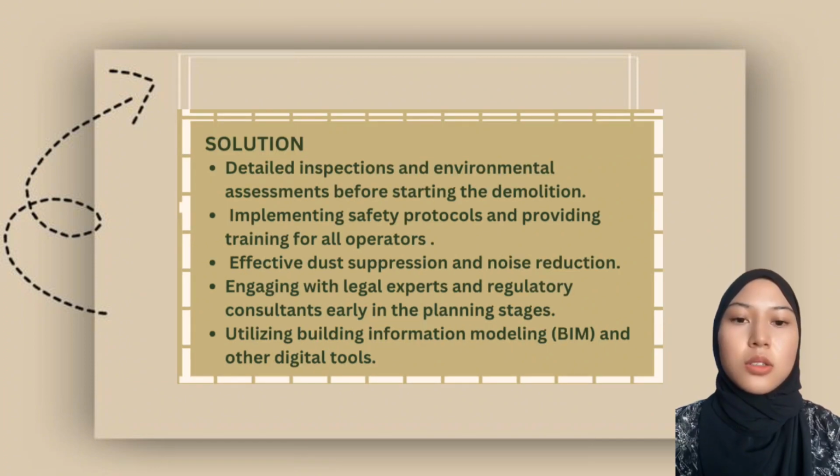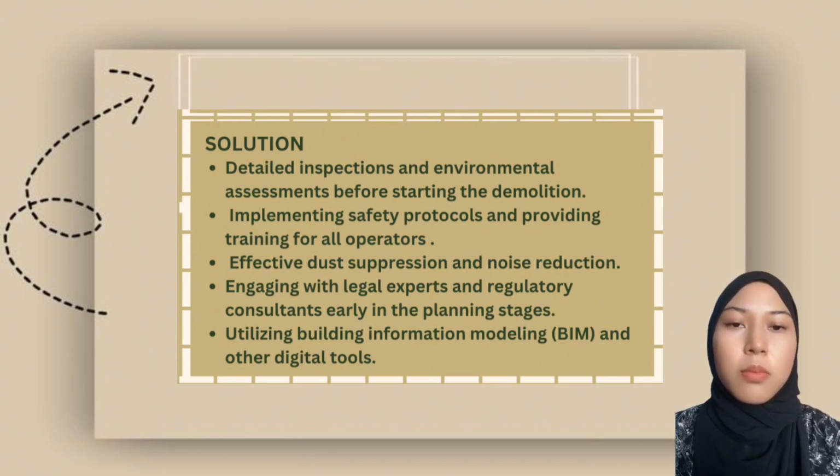The next one is the solutions to the problems encountered. First, detailed inspection and environmental assessment before starting the demolition will help identify potential risks. Developing a contingency plan that includes steps for handling unexpected findings can help reduce delays and manage additional costs.